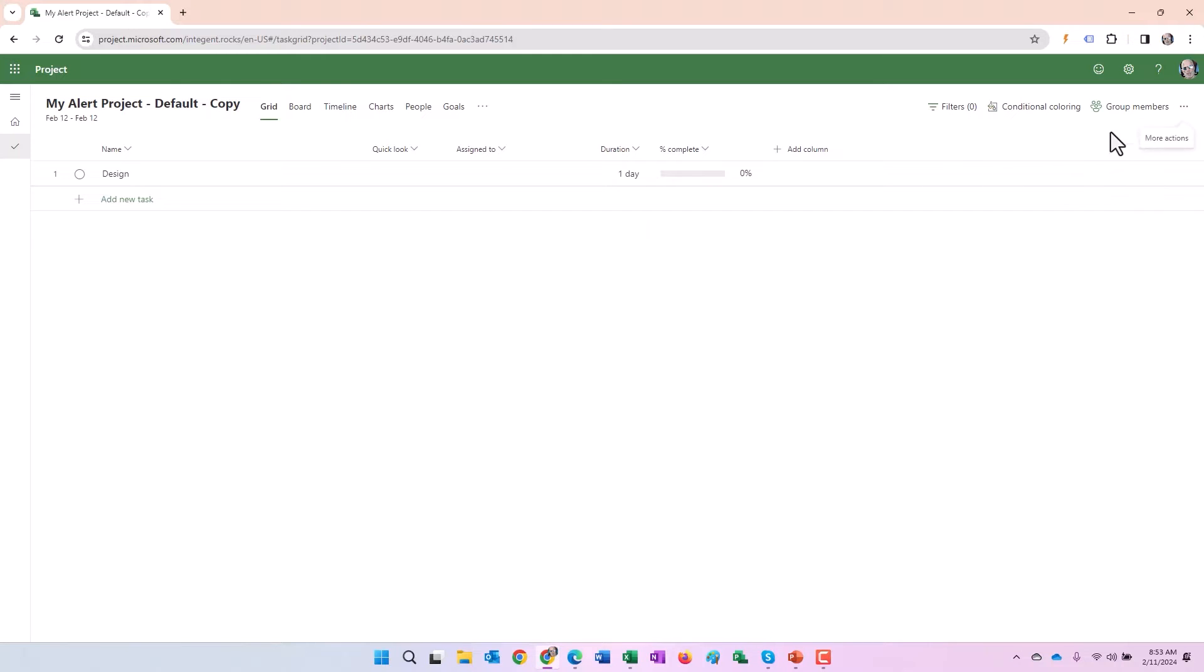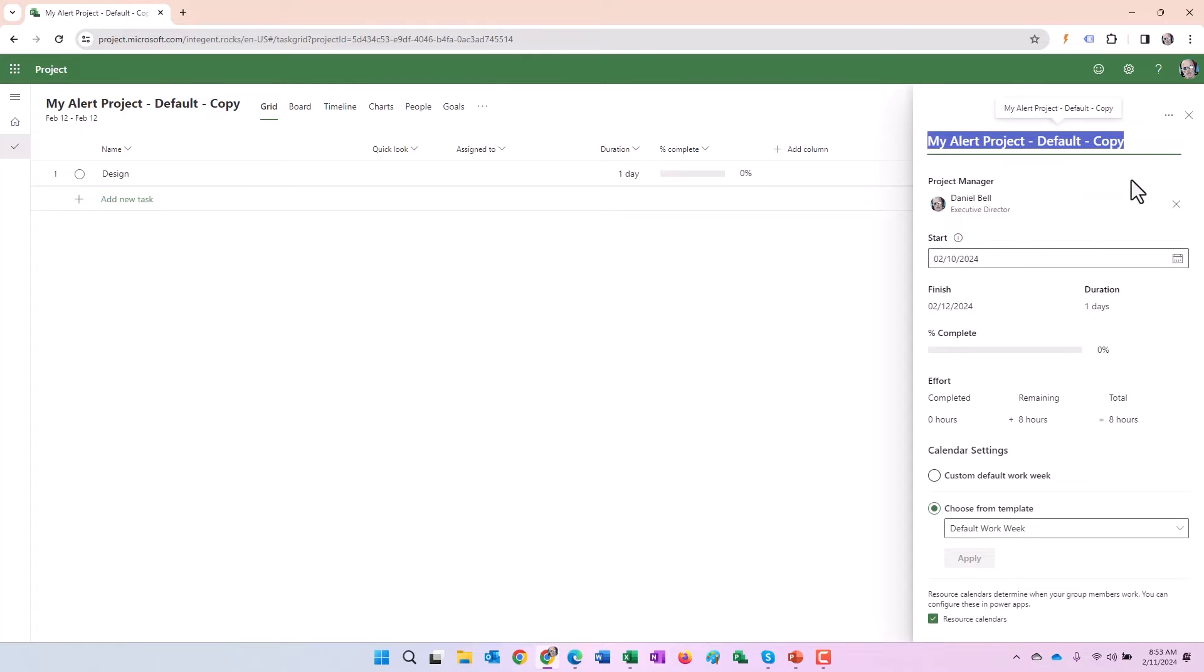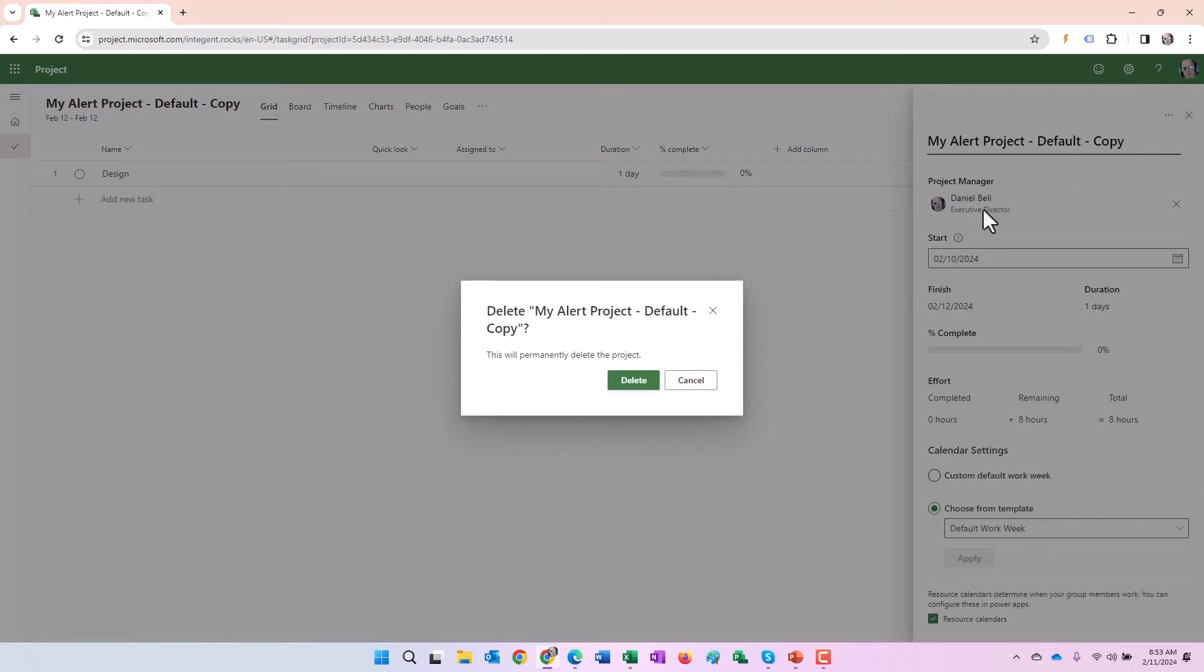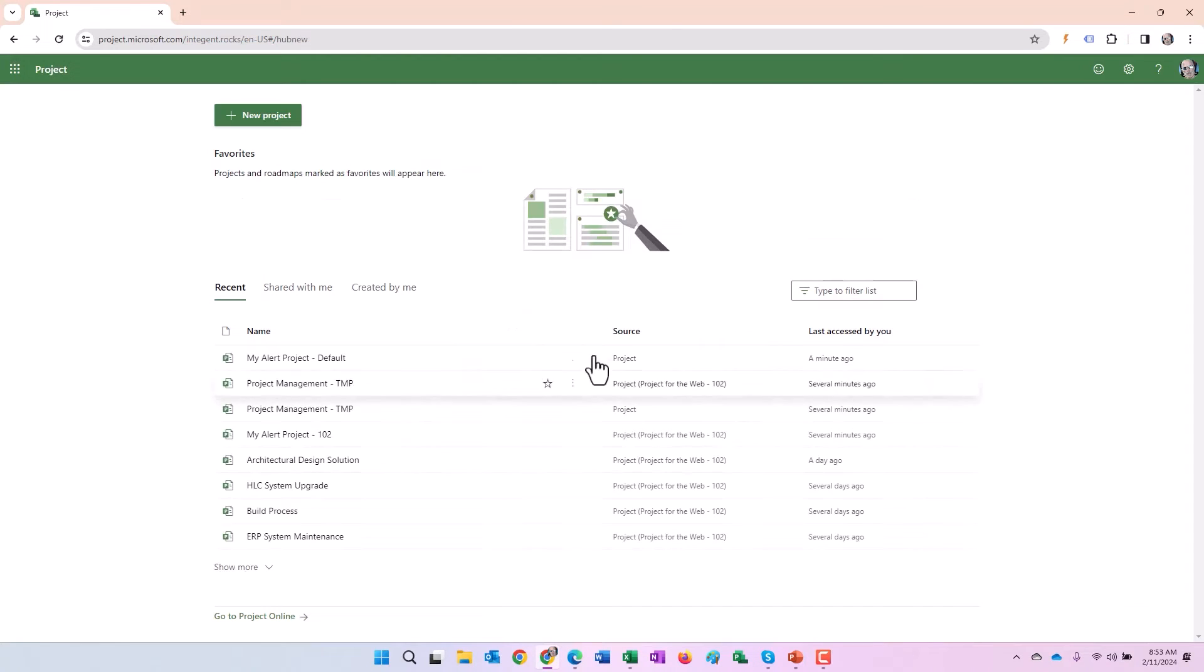Well, how do you delete it? The delete is not readily available there. If I actually go into project details, there's another ellipsis in here. And when I locate that ellipsis, you'll notice there's the delete project functionality right there. I'll go ahead and select that. Of course, I'm going to get a confirmation. Go ahead and select delete. And now we just went ahead and deleted that project.